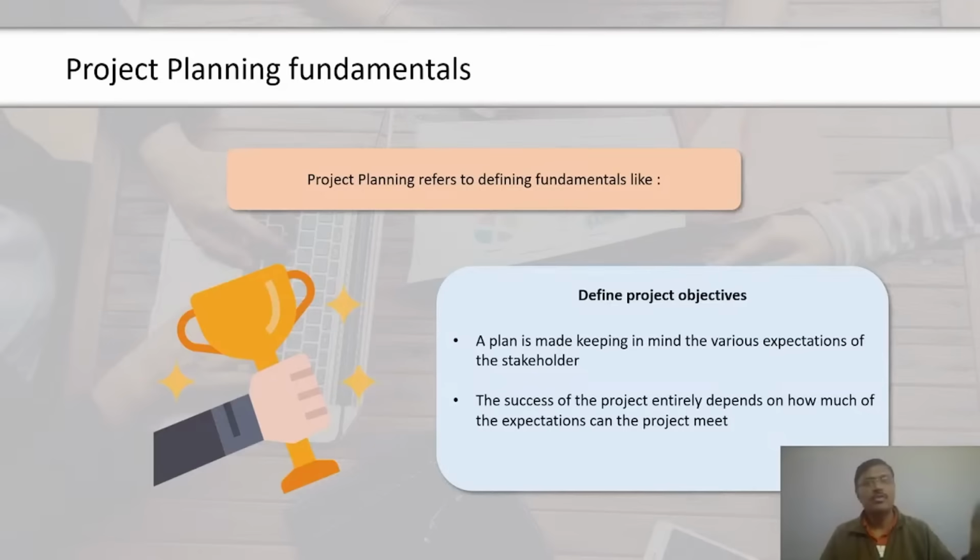In the next screen, let's focus on schedule compression. Look at the 4 activities in the table. The normal cost of executing each of the activities, as well as how much each of the activities can be crashed, is also provided. Which activity would you crash to reduce the project time by 1 day? Activity A will be crashed if the duration of the project is reduced by 1 day, as the per unit cost of crashing the activity A is the least.